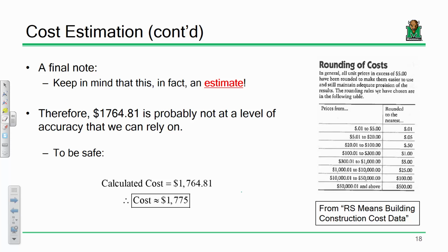That's a good question. The question is, how much waste factor should you use? I mean, 5 to 10% is pretty reasonable. I would also say that there really isn't a hard and fast rule. There is something to be said about using engineering judgment on the project you're working on. For instance, I wonder if you would use the same waste factor on a driveway in your backyard versus a dam. See what I mean? I'm almost purposely being a little tight-lipped and letting you use a little bit of judgment on it. Does that make sense? These are really good questions. Anything else?